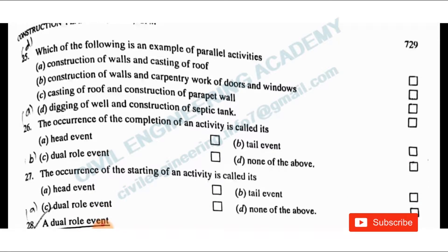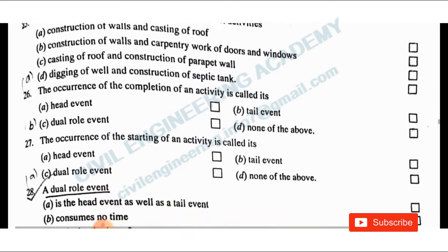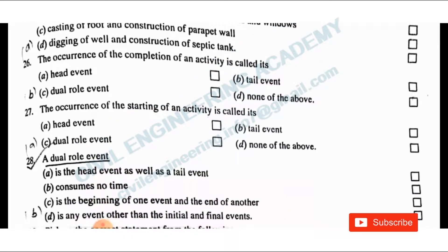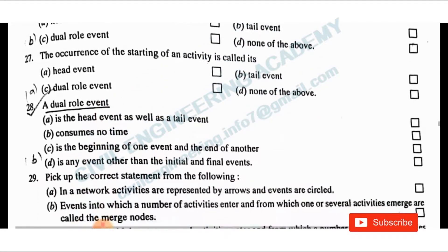Question 26: The occurrence of the completion of activities is called a head event. The occurrence of the starting of an activity is called a tail event. A dual role event is both the head event as well as the tail event — it consumes no time, is the beginning of one event and the end of another event.